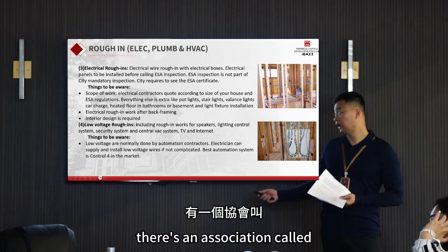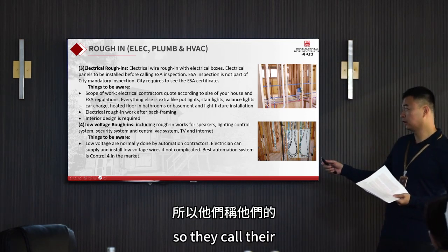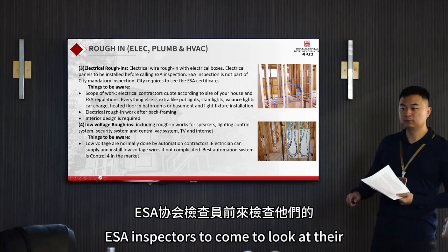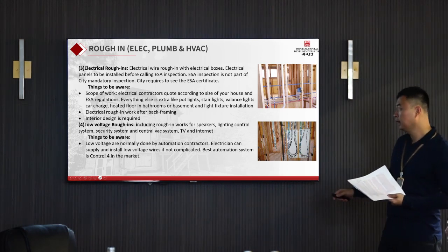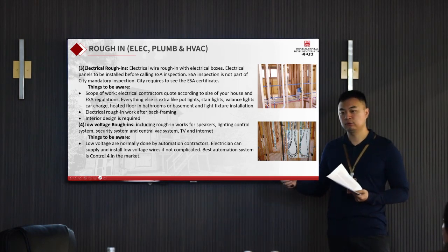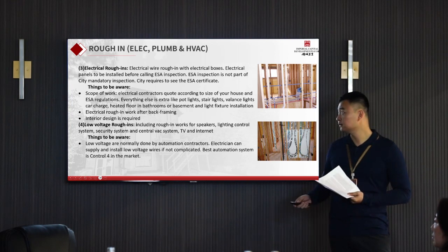There's an association called ESA. So they call their ESA inspectors to come to look at their electrical work. In order for the city to close all the roughing inspections, you have to provide this electrical certificate to the city.